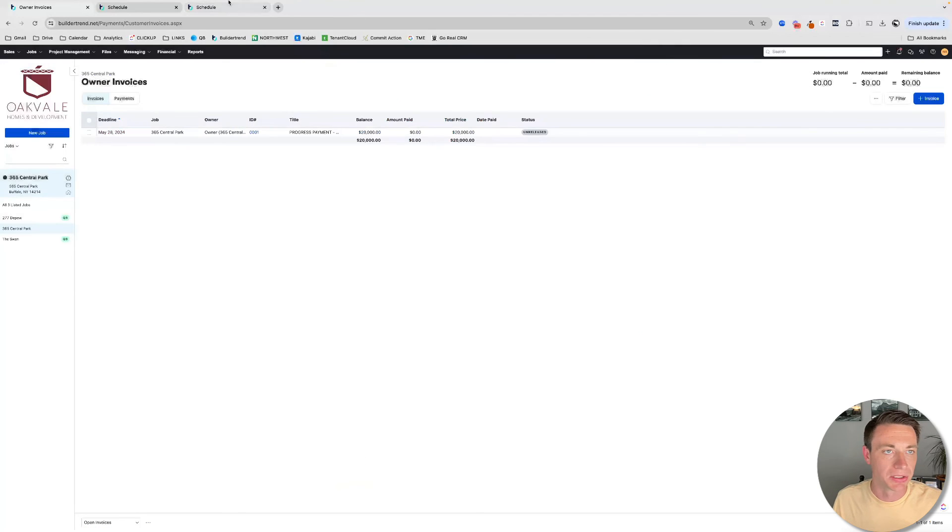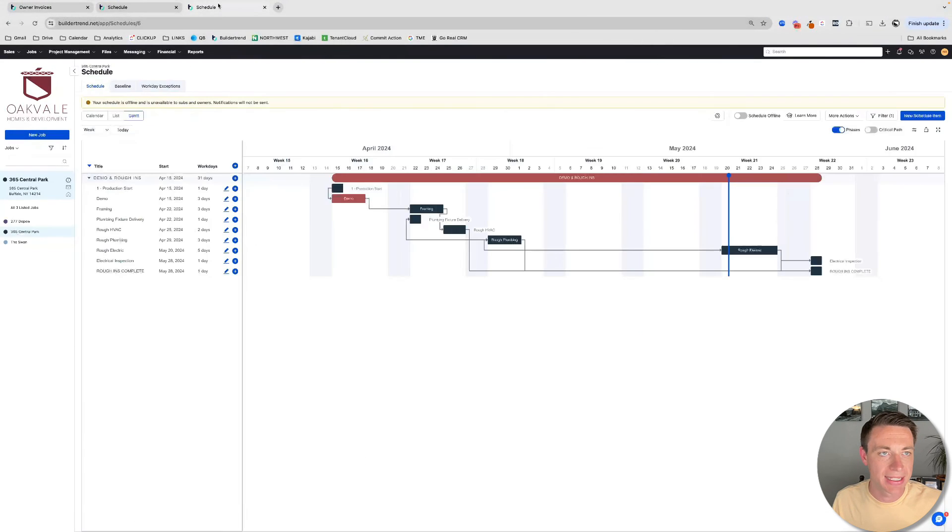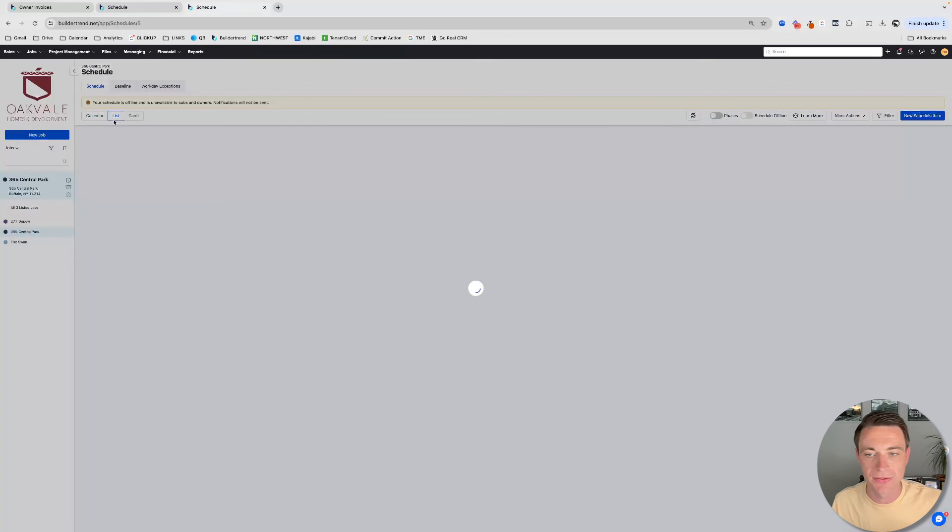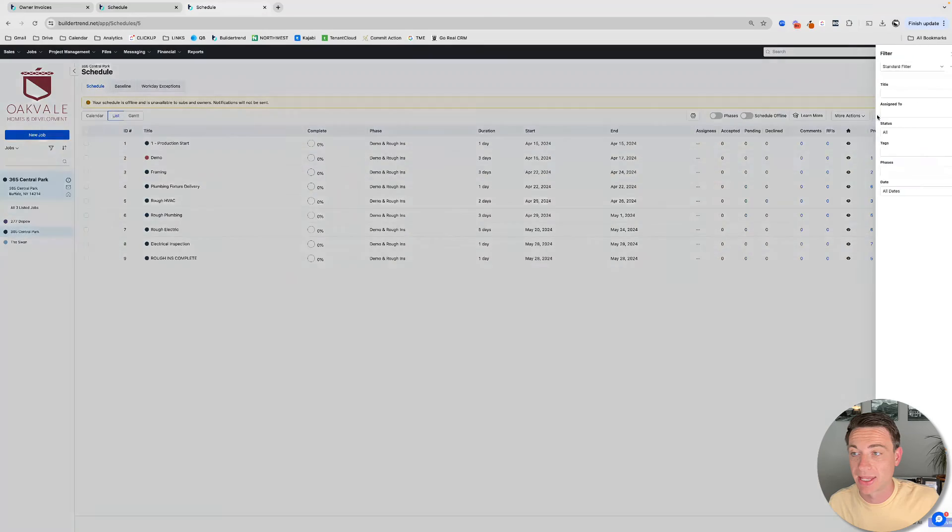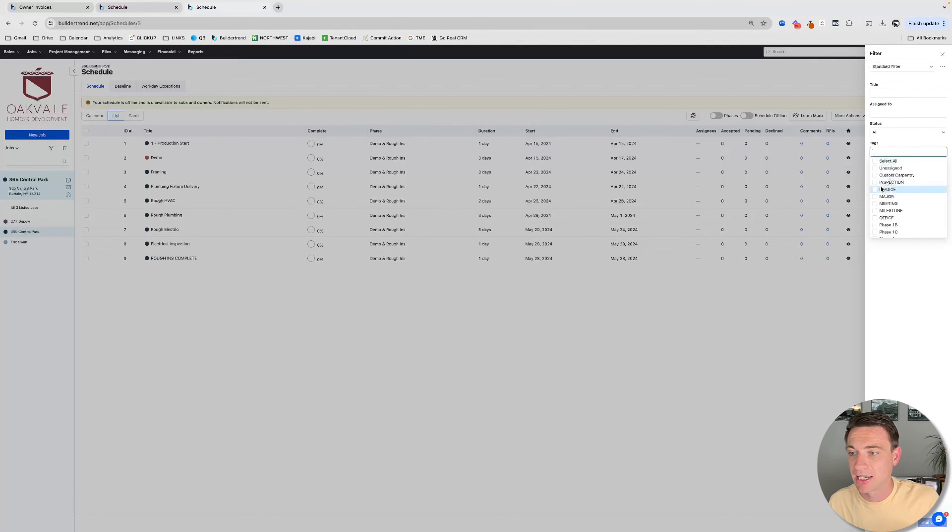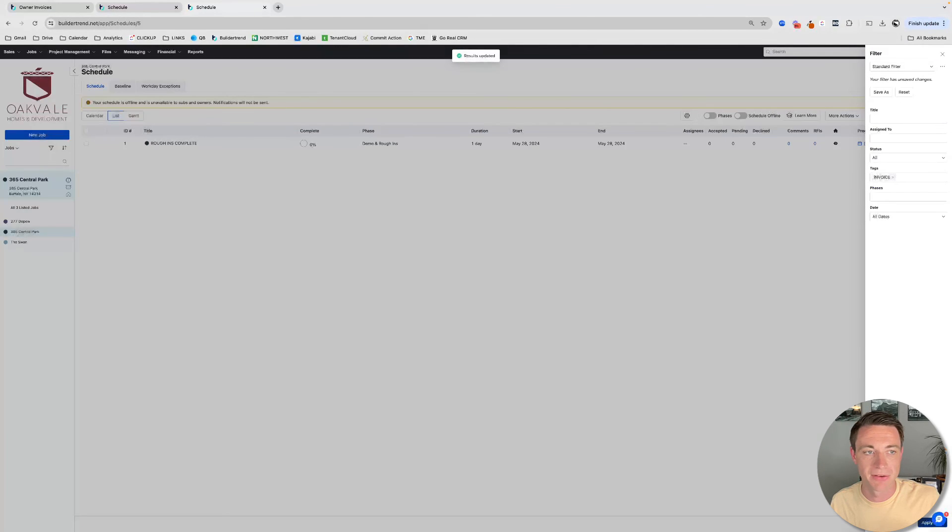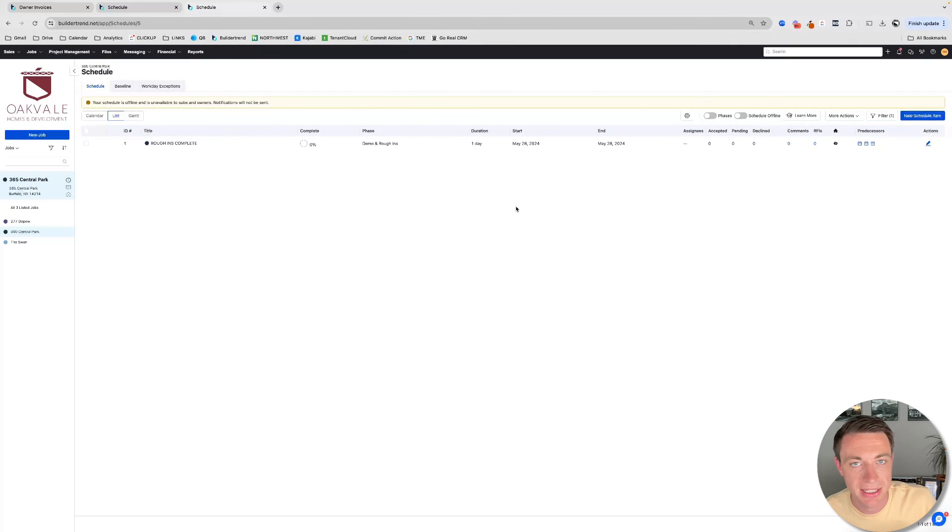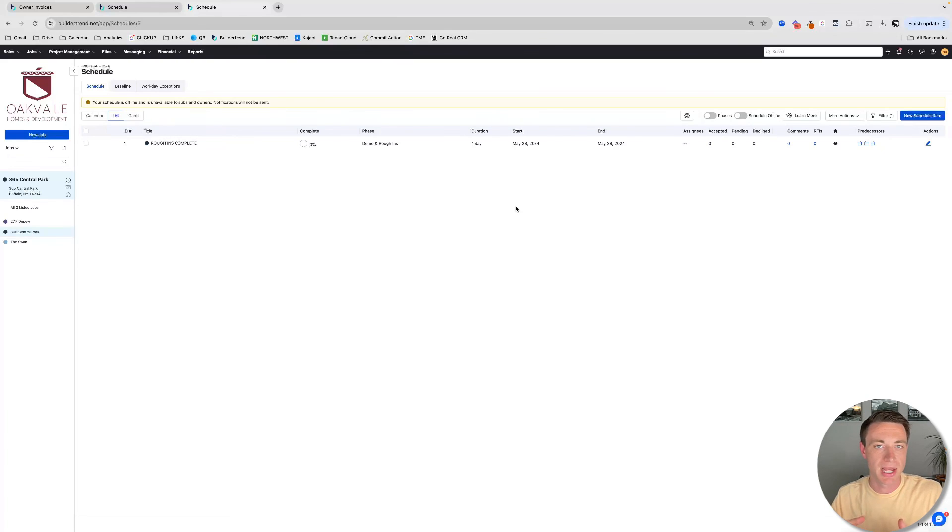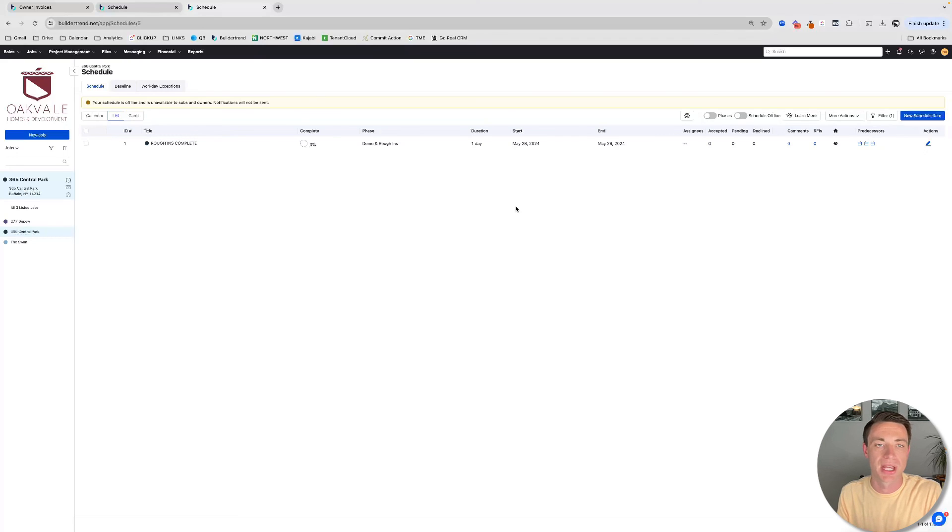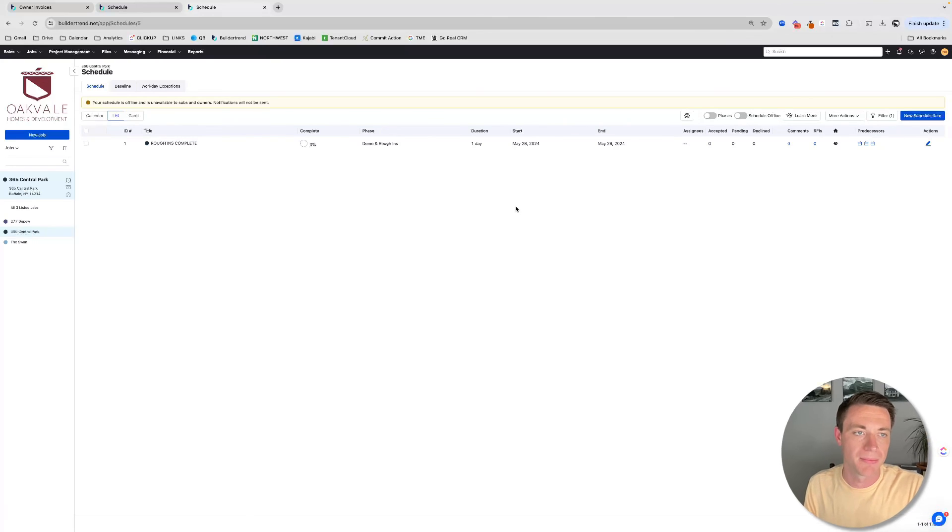And then, little teaser, what I do with those tags is now I can like look at my entire schedule. Maybe in a list view is a good way to do it or a calendar, whatever. And you can filter then on that tag. And you can say, give me anything that has the invoice tag to really show me like here's where my invoices are going to be due. And these are the tasks that I'm going to tell the team, listen, we're tracking toward an invoice. If we get this stuff done, we get to get paid. So let's kind of focus. Let's move. Let's go. So I'll take this schedule during a production meeting and we'll filter on those invoices so that we can understand what those really key tasks are. Let's try to get these things done maybe before the weekends, before a holiday, so that we can issue that invoice and get paid.